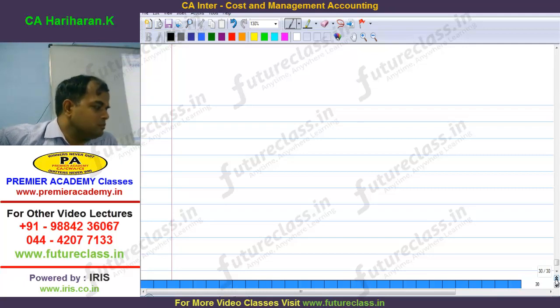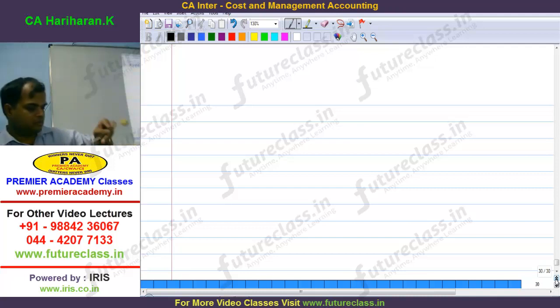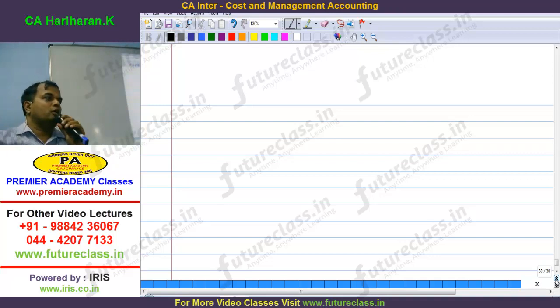Materials in standard and actuals and labor in standard and actuals are given. Remarking the full actual consumption of material and wages, the company has claimed a final price of 1,77,360. Give your analysis of the admissible escalation claim and indicate the final price payable. This question is based on the escalation clause.